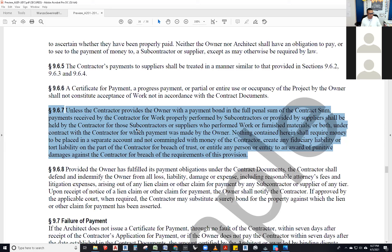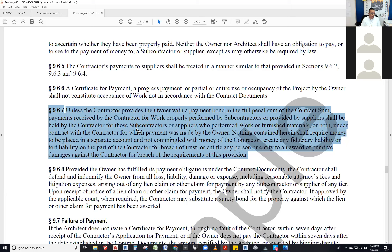Within about ten days prior to the payment being due — let's say the 30th of every month — so around the 20th, the contractor comes to the architect with an application for payment. Many people call it a requisition, but it's mostly an application for payment. That application says, 'I want payment for, let's say, five hundred thousand dollars for such and such,' and they break it down and put attachments to it.